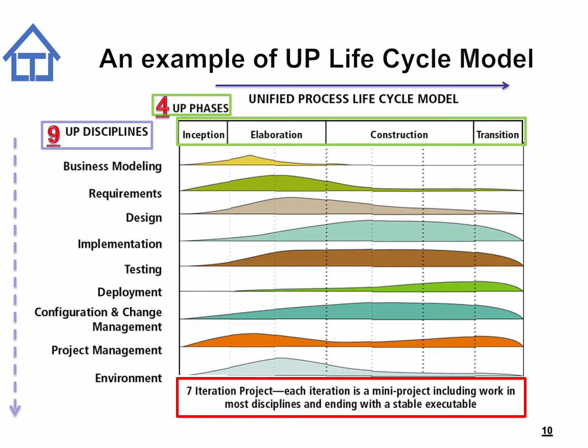What differentiates this approach from the traditional waterfall lifecycle model is that it is possible to backtrack from one iteration in a particular phase of the lifecycle to an iteration in the previous phase. This allows any issues or concerns to be re-examined or analyzed in the previous phase so that any correction or rectification can be carried out before proceeding on.